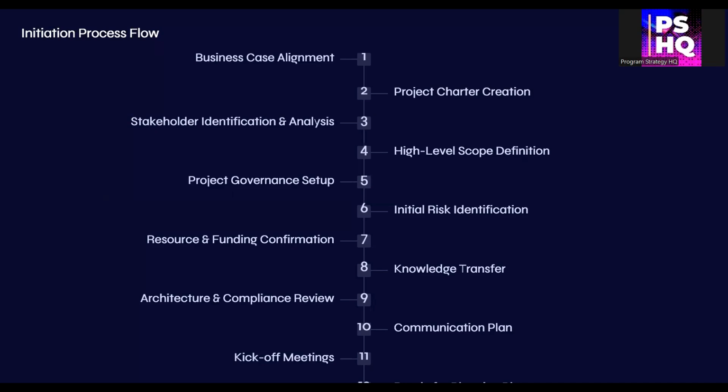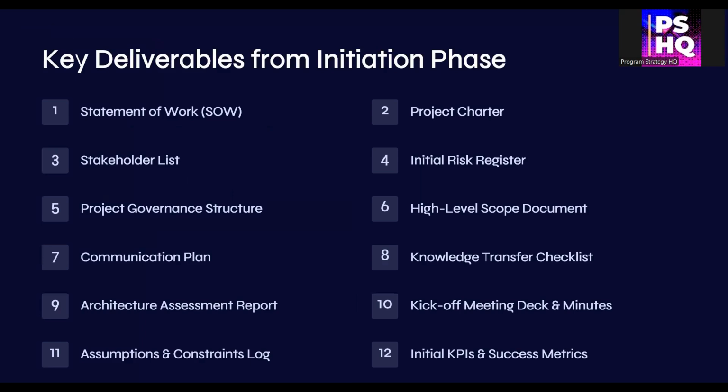At the end of initiation, you should have clear deliverables: a statement of work, a signed project charter, a stakeholders list, an initial risk register, an assumptions log, a defined governance structure, a communication plan, an architecture assessment, kickoff meetings, and aligned KPIs.